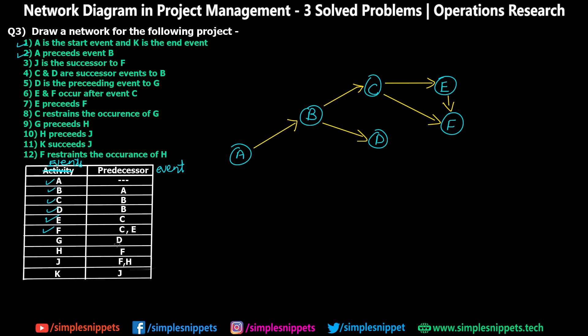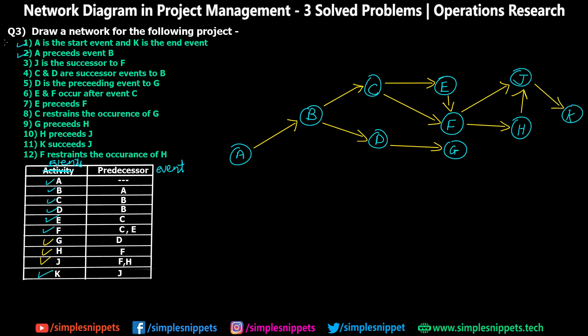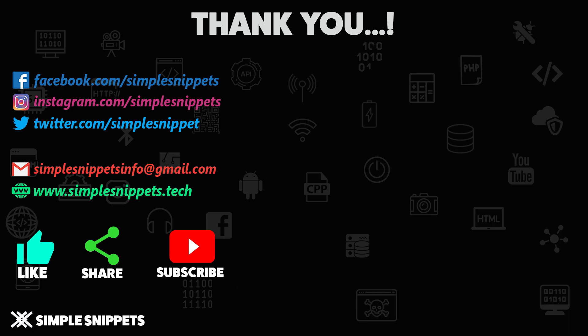G is preceded by D, so D leads to G. H is preceded by F, so after event F an activity results in H. For J, F and H are required — two activities result in event J. Lastly, K requires J, so after J an activity results in K. This concludes the third question and the last type of network diagram question — in the form of events and predecessor events. I hope the three different numericals are very clear. If you liked this video please give it a thumbs up, share it with your friends, and see you in the next video.